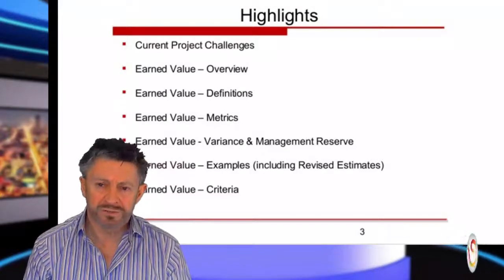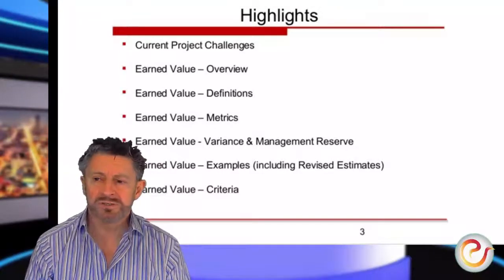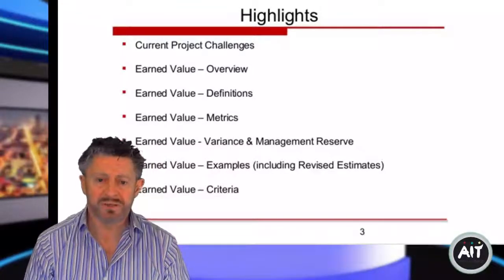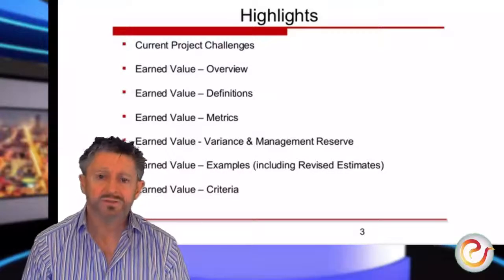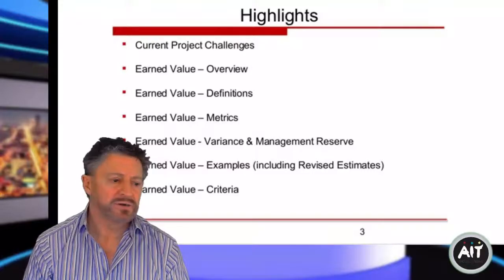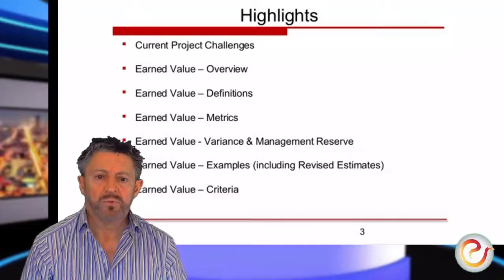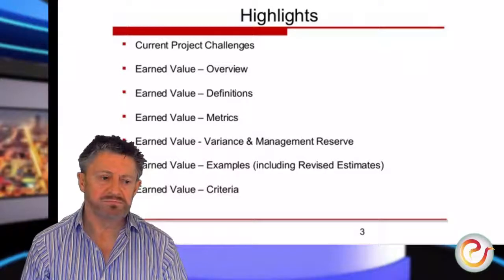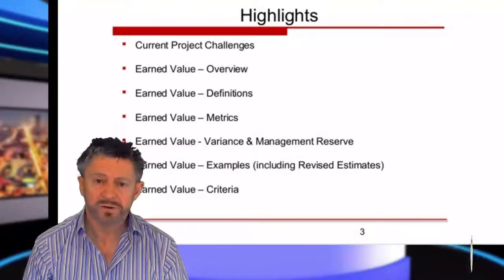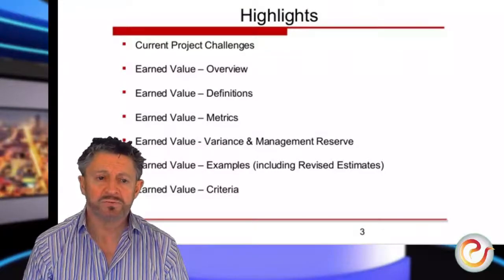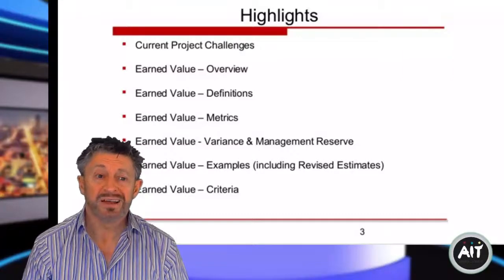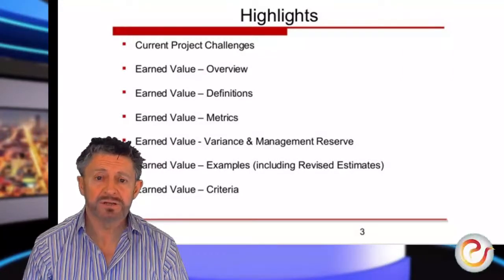So as you're getting into the project, because remember, if your project is 9 months long, you don't actually know what's going to happen in 3 months' time, or in 7 months' time, or in 5 months' time. So something can happen in your project that causes you to change. Let's say for argument's sake that there's some wage agreement that has been approved by the company or the government or whomever, and it meant that all the basic wages go up by 2%. So now you have to say, well, I have to revise my budget and add 2% onto my labor cost.